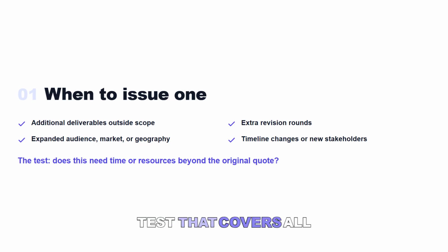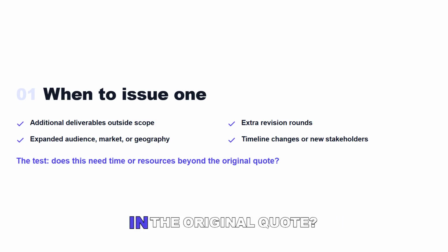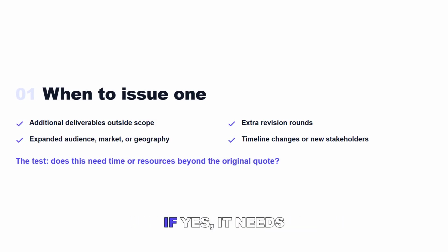And the simple test that covers all of these: does this request require time or resources beyond what was in the original quote? If yes, it needs a change order.